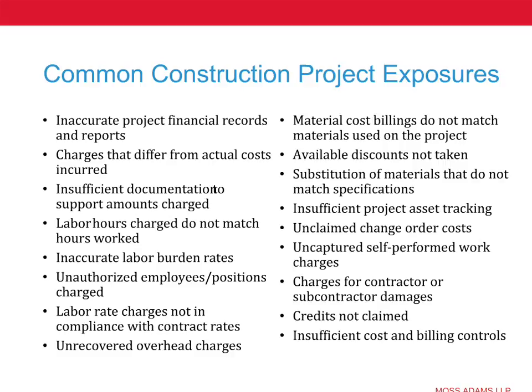And that has to do with budget versus forecast. Forecasted cost of completion or estimated cost of completion. A lot of organizations don't really have a regimented approach to doing this. They may try to manage it through what they understand about change orders, or I've seen organizations that basically look at what cost was incurred to date and compare that to the budget, which is absolutely wrong.